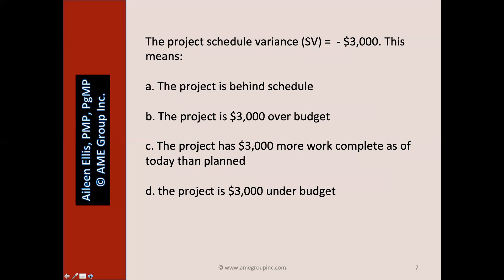Here we have another sample question. The project schedule variance equals negative $3,000. Pause the video and answer the question. Is this about schedule or cost? This is definitely about schedule. Answer B, 'the project is $3,000 over budget,' must be wrong — that's about cost. Answer D, 'the project is $3,000 under budget,' must also be wrong — that's about cost, not schedule.